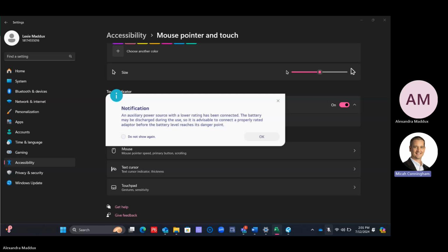But say I had it tied to your building pad. So I'm going to say building pad, building A, and say that this is building A. So if I tie building pad, building A to the start of layout and grade pad, now I have this specifically tied into building pad for building A, which is this building.